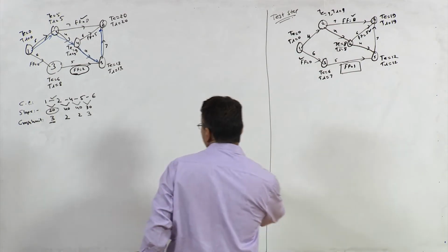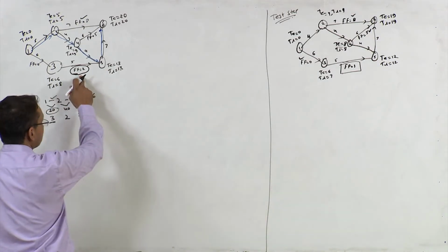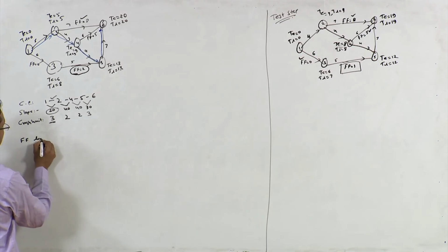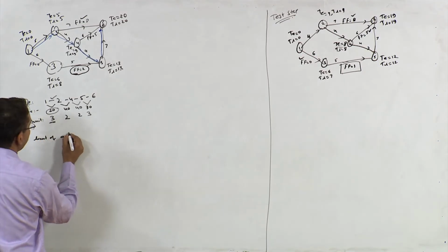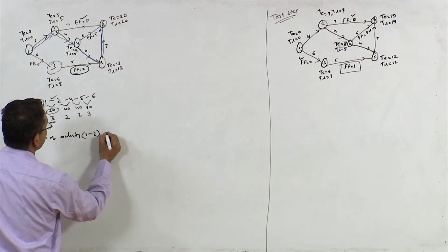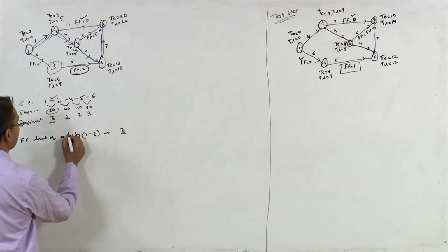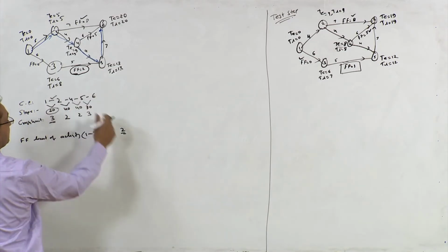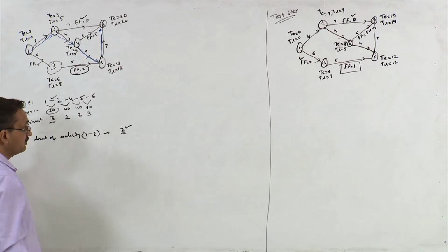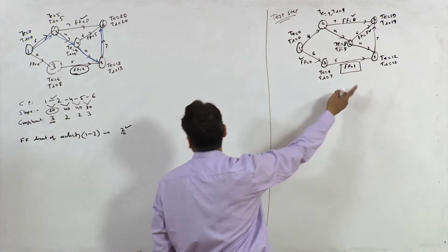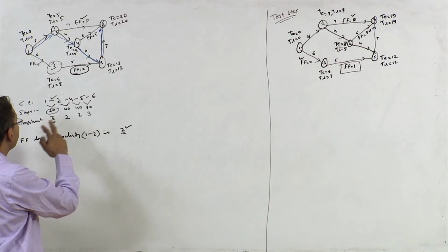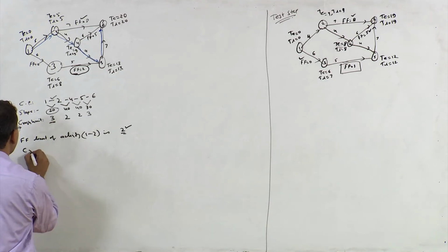So this is known as free float limit. So free float limit of activity 1 2 is 2, right? Free float limit of activity 1 2 is 2. We don't have to see this limit, right? We will have to check this limit, right? So free float limit of activity 1 2 is 2. Its crash limit is what?